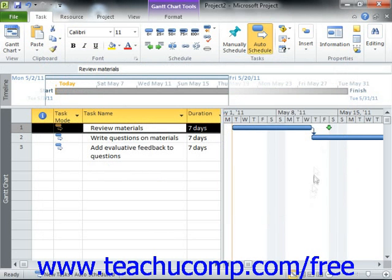You should now see a deadline date indicator appear for that task row within the Gantt chart view of your project file. If the task is ever scheduled beyond the deadline date, Microsoft Project will display a missed deadline indicator for that task in the Indicators column shown in the Gantt chart view.